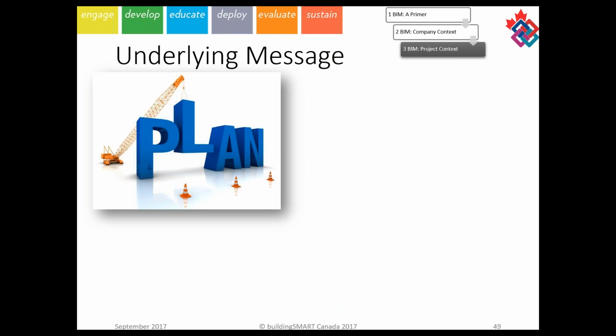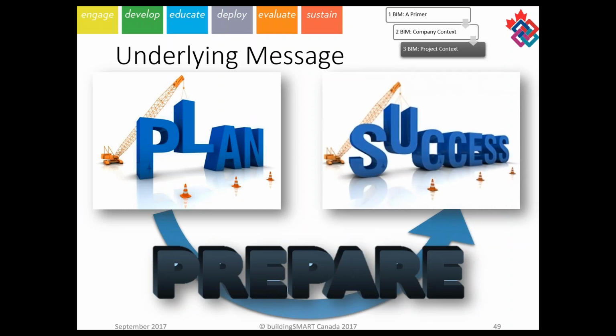Put together a different way, if you really want to work, you need to plan, you need to prepare, and if you do that, then you'll have success. A lot of the feedback that we got during this process is that from a practical point of view, people found that when BIM didn't work or when they had challenges, it was because they didn't take the time up front to communicate goals, to communicate the processes, and they didn't actually have agreements on what was going to be done, and that was where things caused issues.